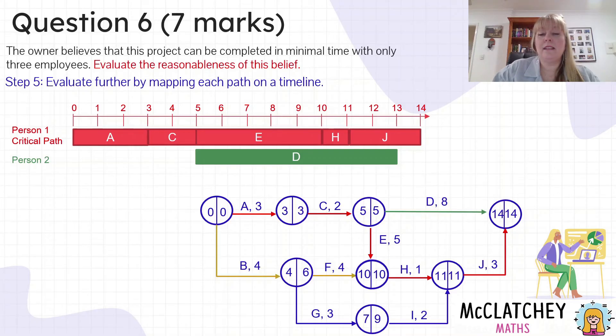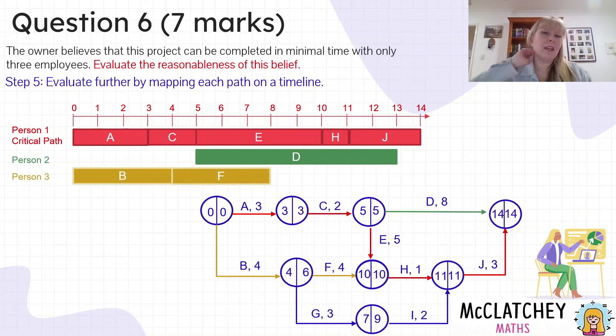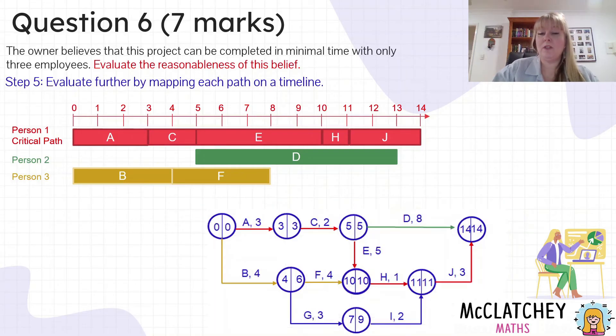Now we're going to look at this next pathway, which is activity B and F shown in orange. And we can see the activity B and F, and we put that on the timeline. It actually overlaps with what person one's doing on the critical path and what person two is doing. So we know we've got three people working there all at the same time. Now we need to work out what's happening on our final pathway G and I, because G and I might actually be something that's happening separate to those activities.